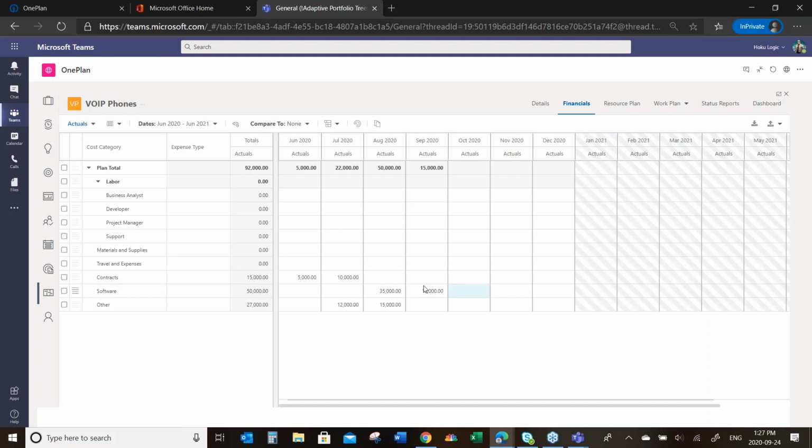For capturing actuals, there really are three scenarios. One, you could do what I just did. You can enter in that data manually. The invoice is here on your desk, and you want to be able to track it. Number two, the resource data, you'll notice none of that's been entered yet, is we can pull that from the timesheet system that we have here, or from task updates, or potentially from actuals that were captured in Microsoft Project or elsewhere, and we roll those through, and with a rate in the background attached to that role or to that resource, it can funnel to here as an actual.